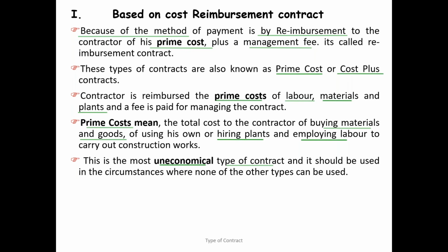As much as the contractor is spending more money, whatever money he incurred and paid, that amount is supposed to be claimed from the client, isn't it? Yes or no? Okay, if the contractor brings 20 labor instead of 10 labor for 10 days, he will make money or not? He'll make more money, right? Which is uneconomical. It is not preferable.